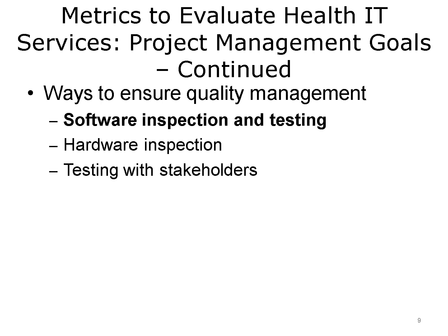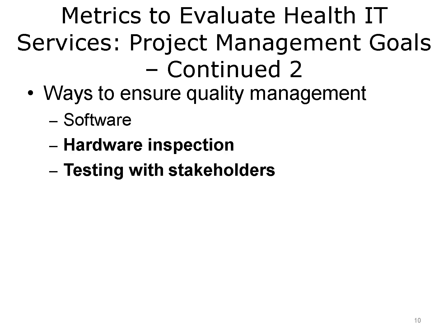First, the IT team verifies that the software, such as applications, virus protection, and tools, is properly loaded on the workstation. Next, the software is tested to ensure it provides the functionality required by the clinicians. Then the performance of the workstation on the hospital's secure wireless network is checked. Hardware should be inspected before it's taken to a unit and deployed and tested again during the auditing process.